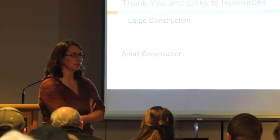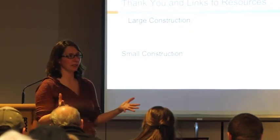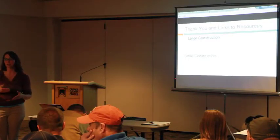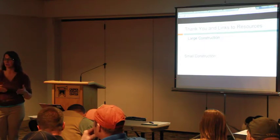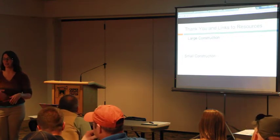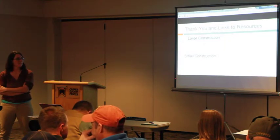The other thing you could do is, if your map is getting really busy and you just can't tell what's going on anymore, you could file that, stick it behind your SWIP in the same binder, and start a new map. That way you've got your historical record there, and you've got a fresher one that maybe isn't so busy. But if you're keeping a running total, make sure you're concise on what you're saying. That's why we like the maps, because we can visually see what is going on.